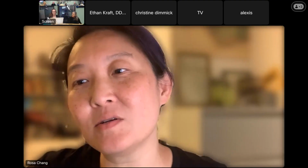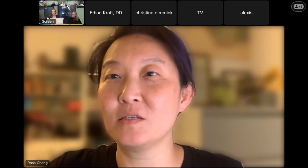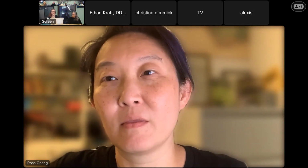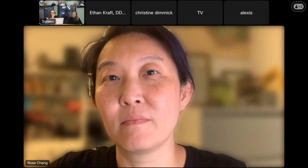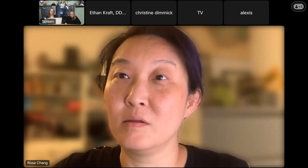And so then, Alexis, the funding that you have in place, how long does that carry you for? When do you stop designing because you've run out of money? Our current contract, this phase of work with Arcadis, is set to wrap up this fall. We can extend the contract for a year if we had additional funding, but we're basically wrapping up all of the scope that was contemplated and funded by the end of this year. And without fiscal year 26 money, we won't continue.